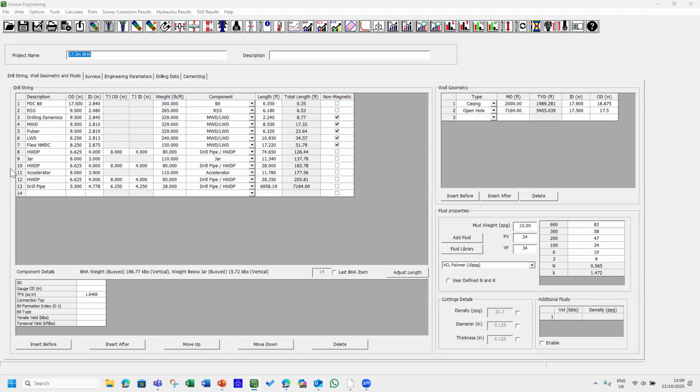That real stuff is to actually evaluate all the sections, run the well engineering iterations, and check that the results look okay. Can you drill this section? What do you need to change? For example, this 16-inch section will be drilling from 2000 feet to 7165 feet. Can you drill it? Okay, let's have a look. This is 16-inch, so I'll just put 16. It's not 17, it's 16.